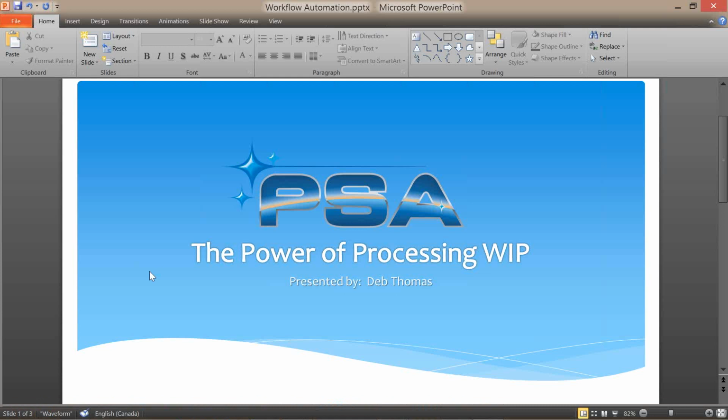The only exception is you're not going to run WIP in May until all your costs dated April have been posted. So if your mail lags 10 days, you're not going to start May WIP until after the 10th of May because you're still doing April up until that point.